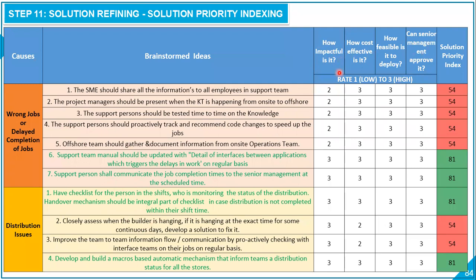How impactful is a given idea, how cost effective is it, how feasible is it to deploy, and finally, can senior management approve or allow the implementation of this given solution. Each and every solution, based on these four scanners, should be rated with either 1, 2, or 3, where 1 is low and 3 is high.